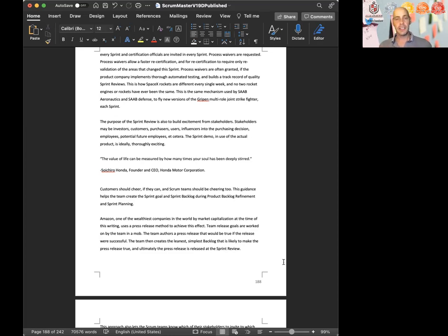Now, ideally, these sprints have full external certification as well. So the company will then invite the credentialing authority to those sprint reviews and say, what other questions would you have asked if we applied for final certification right now? And they'll get questions that then become additional internal tests, ideally automated for speed.